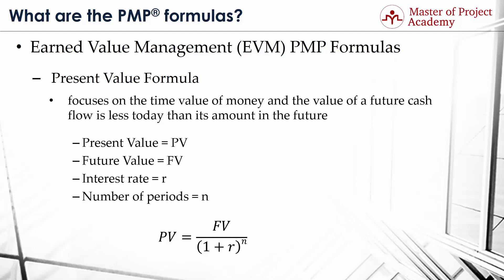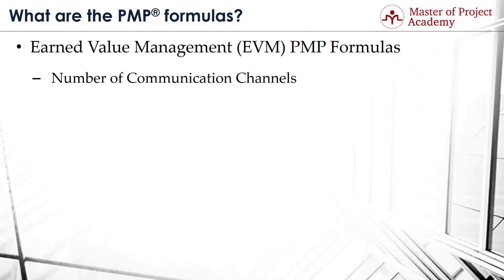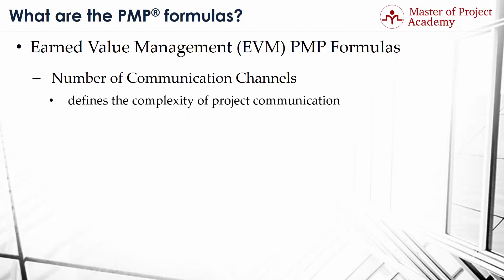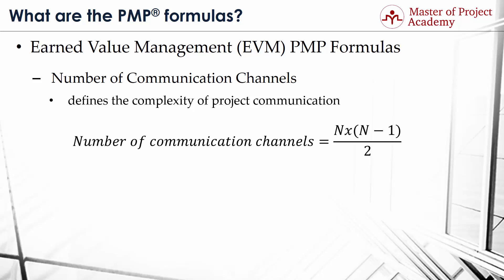PMP formula number 13: Number of Communication Channels Formula. We use this formula to decide on the complexity of project communication. If there are N stakeholders in an environment, the following formula gives the total number of communication channels: Number of Communication Channels equals N multiplied by the result of (N minus 1), all divided by 2.